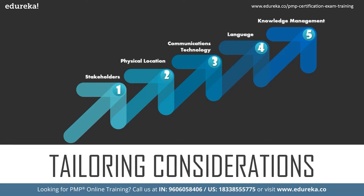Stakeholder identification is not a one-time job; it has to happen throughout the project lifecycle. Their communication requirements must be understood — including physical location, communication requirements, technology and platforms needed, the language, and the knowledge management required for communication. The maturity level of each individual in a specific domain must be considered, so that the communication aligns to that level.